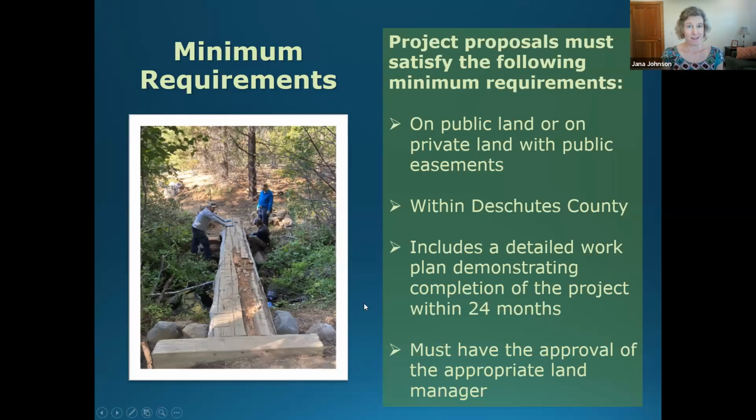Of course, there may be exceptions, for example, NEPA analysis. Sometimes that takes longer than that 24-month period, depending on numerous factors, maybe the timing of a plant survey that happens only once a year, or things like that. Right now with contractors, it's sometimes really difficult to secure labor, so maybe that's a piece of it.